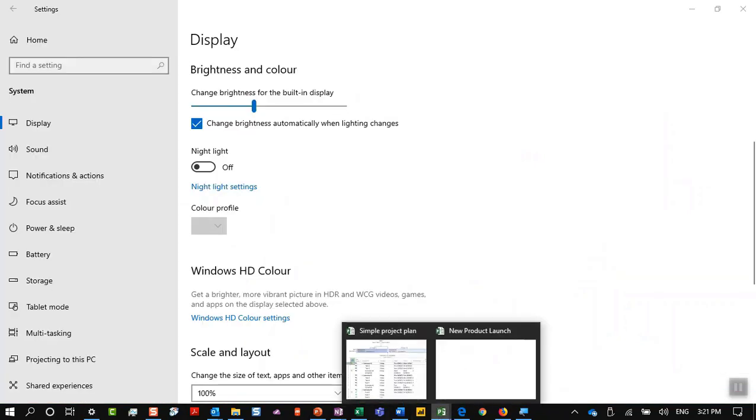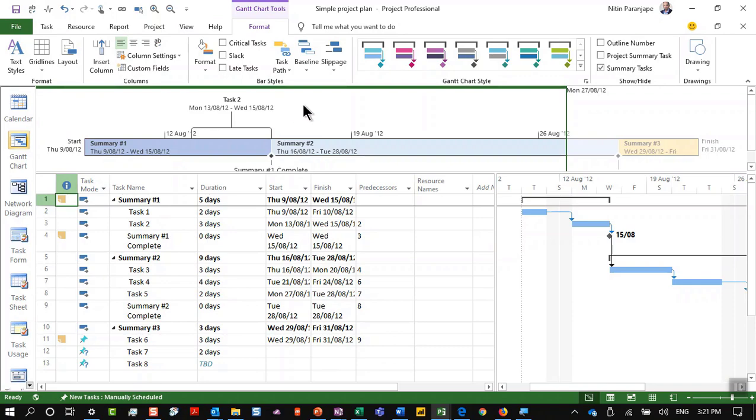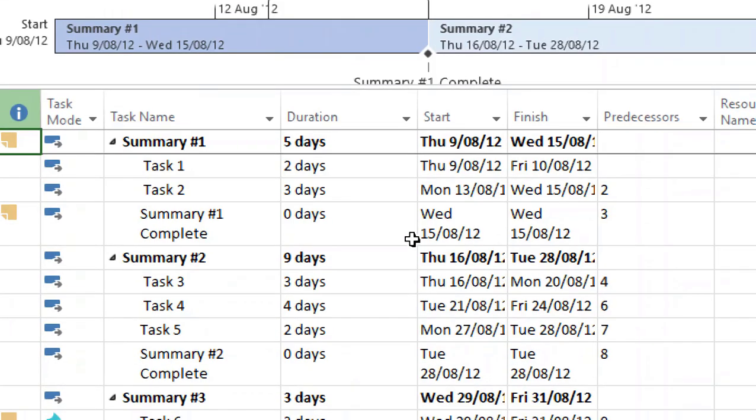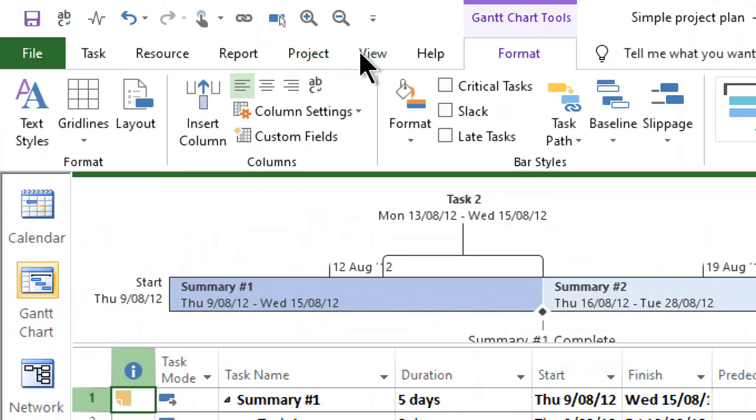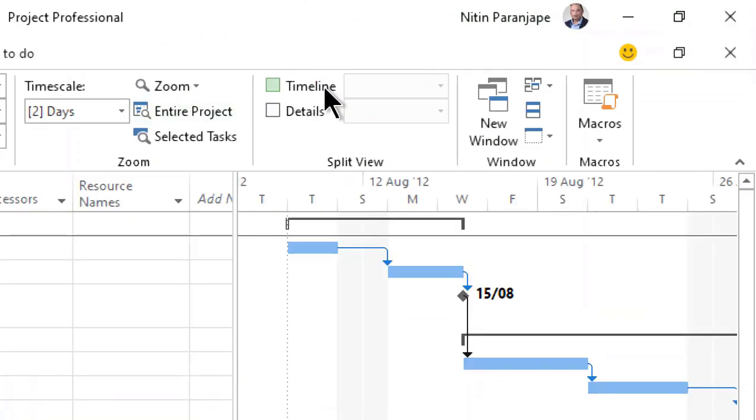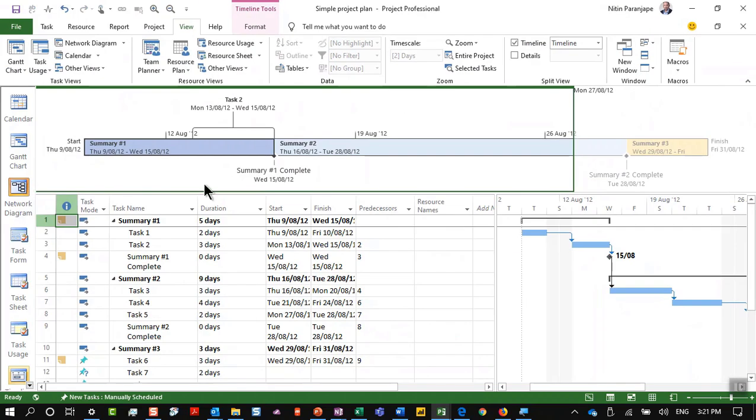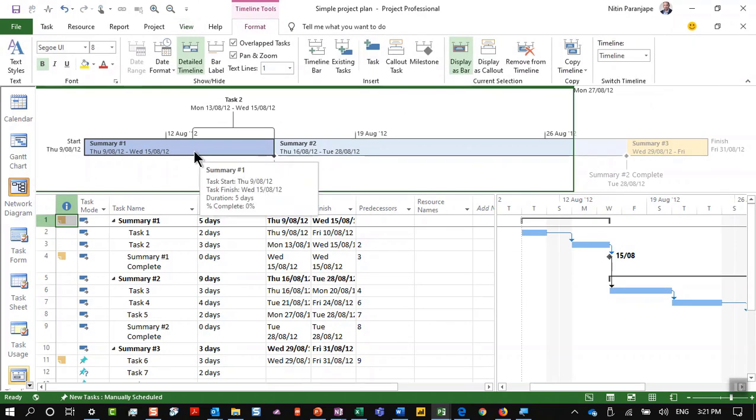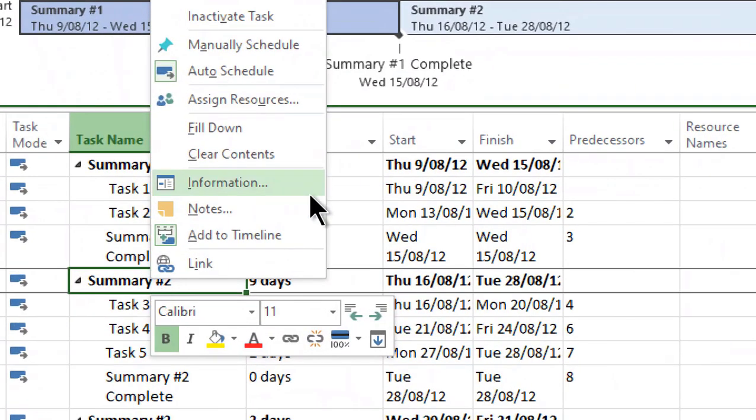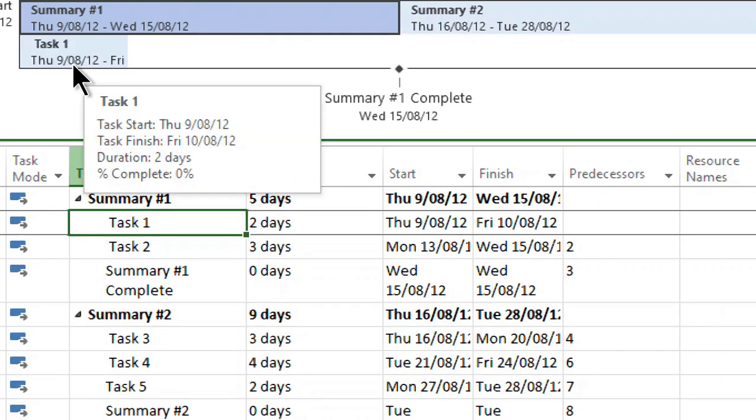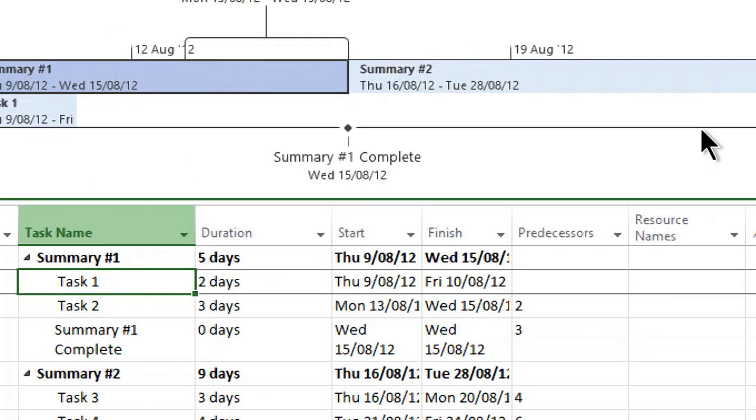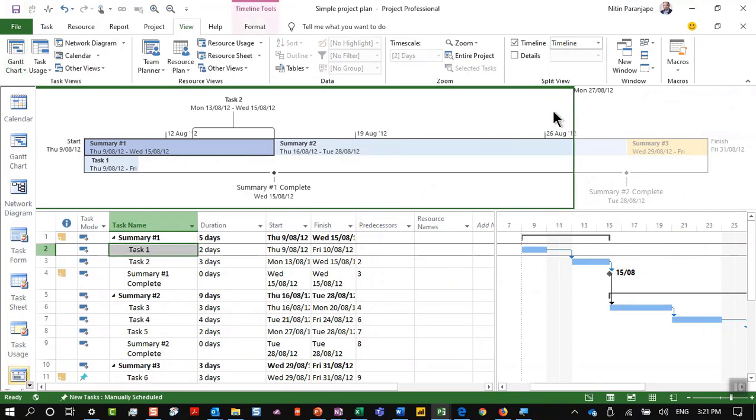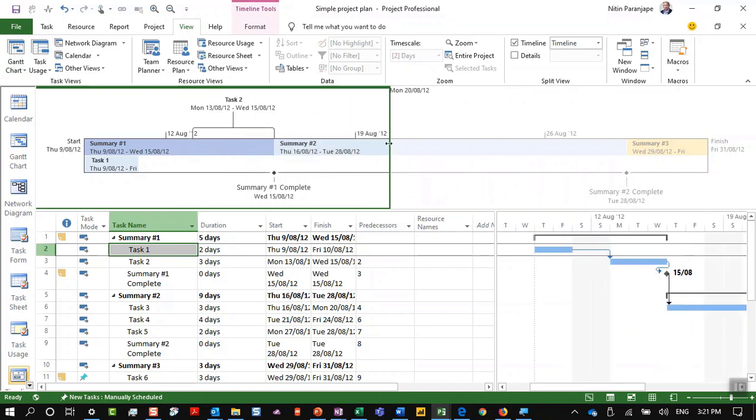So let me show you how easy it is to create a timeline. So I go to Project. I have a project. By default, this timeline is not visible. You see task, you see the picture. That's default. Now, if you go to view, there is a timeline option. So if you enable that, you see the timeline. Of course, it is blank. But what do you do? You right click on any task and say add to timeline. So I say task one, add to timeline. You can change its formatting. You can customize it. Typically, people put milestones also on the timeline. Timeline always shows the entire project duration. You can zoom in, zoom out, and go to a particular part of the project as well.